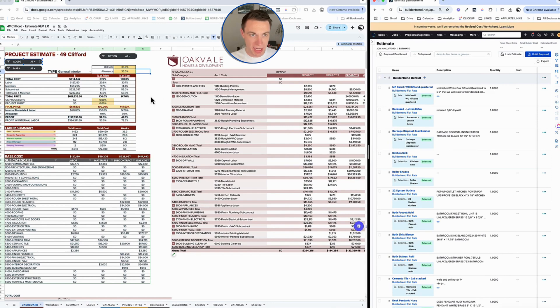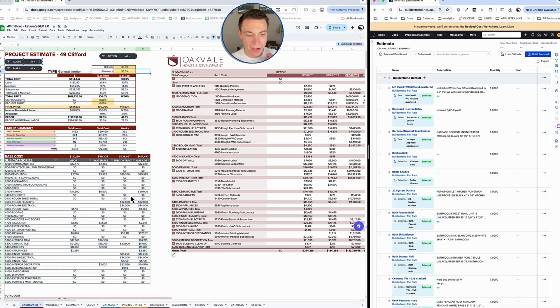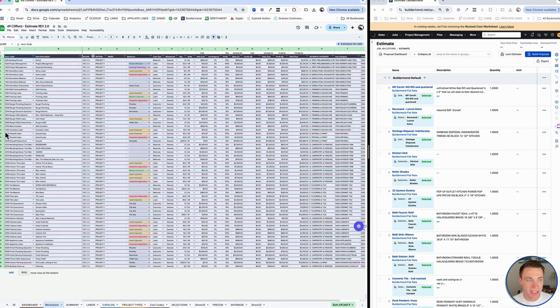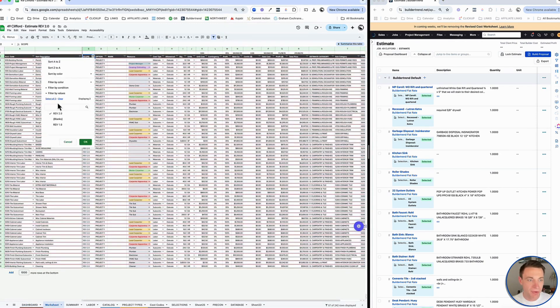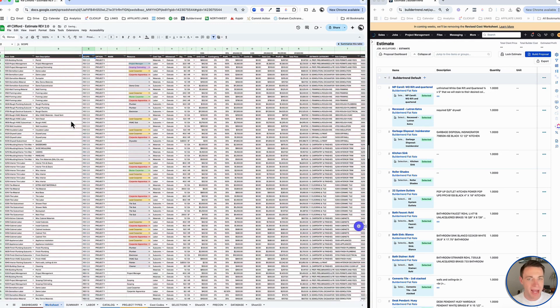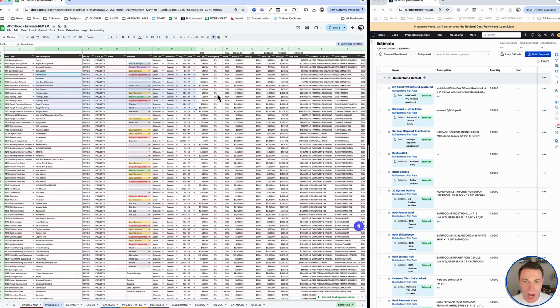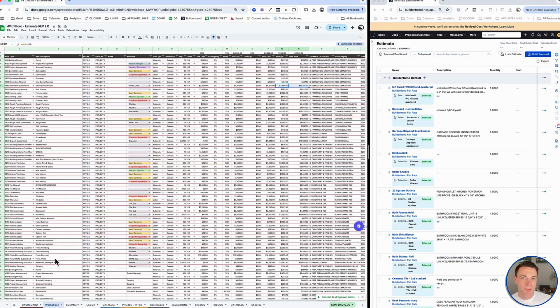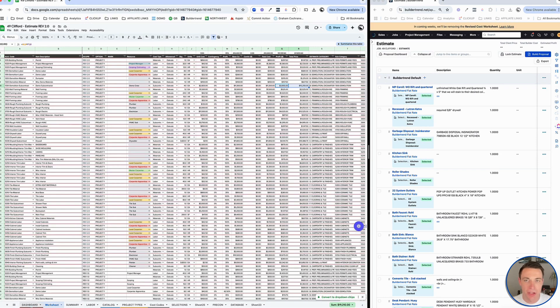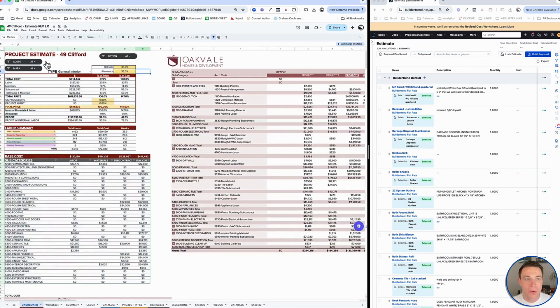This is the template that I use. BuilderTrend's estimate is really good, but I use a bottom-up approach. I have a really detailed spreadsheet that I've created over time. I'm able to bring in past data, different resources, different markups, and I can toggle it, which is really useful. I've got my accounting codes, my description. I build up my scope, the cost, then the profit, then the price. I've got everything built in really nicely. The best part is when we're doing this in pre-construction, working with the customer, the designer, the architect, value engineering, we can toggle all this.